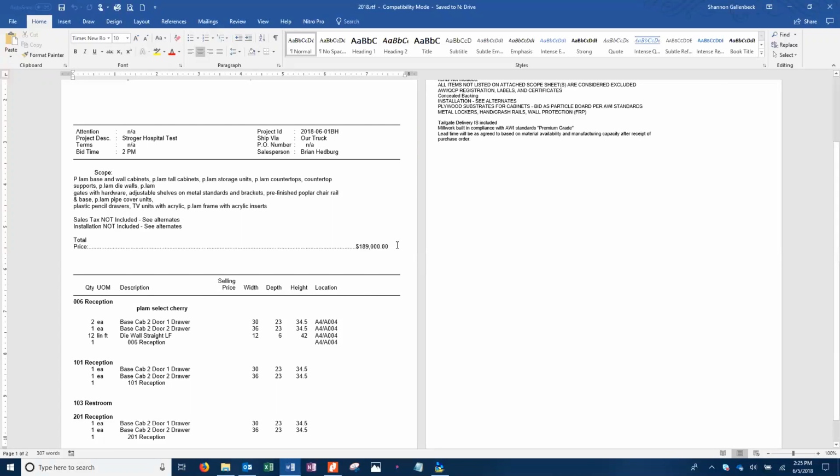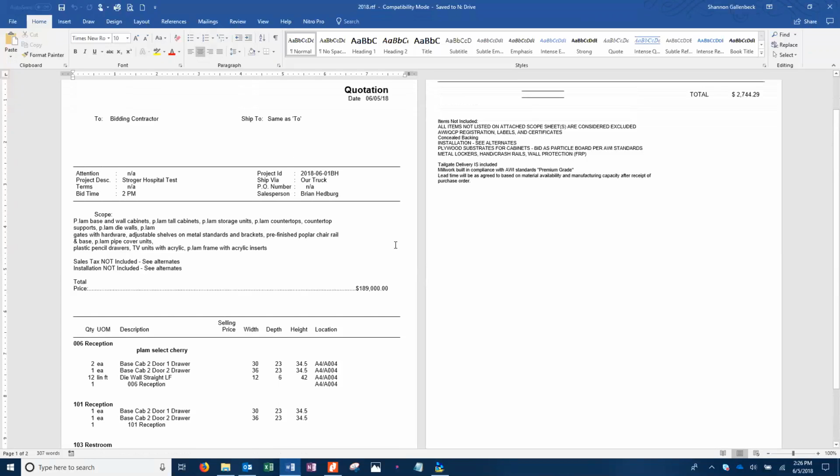And I used to get people coming back to me, so I would bold it and highlight it and make the word Wilson Art bigger. And I would always do it here. Now, the biggest caveat to this is that it does not read back to Project Pack. So if you change that number to $190,000 and you send that off to your customer, guess what? Your quote shows 189. So it kind of is what it is. So if you change it, just know that you're going to have to then manufacture that same change. Like if you add another $1,000 to this, you'd have to somehow add it into Project Pack. Okay. But you can certainly highlight that whole total price now and bold it.